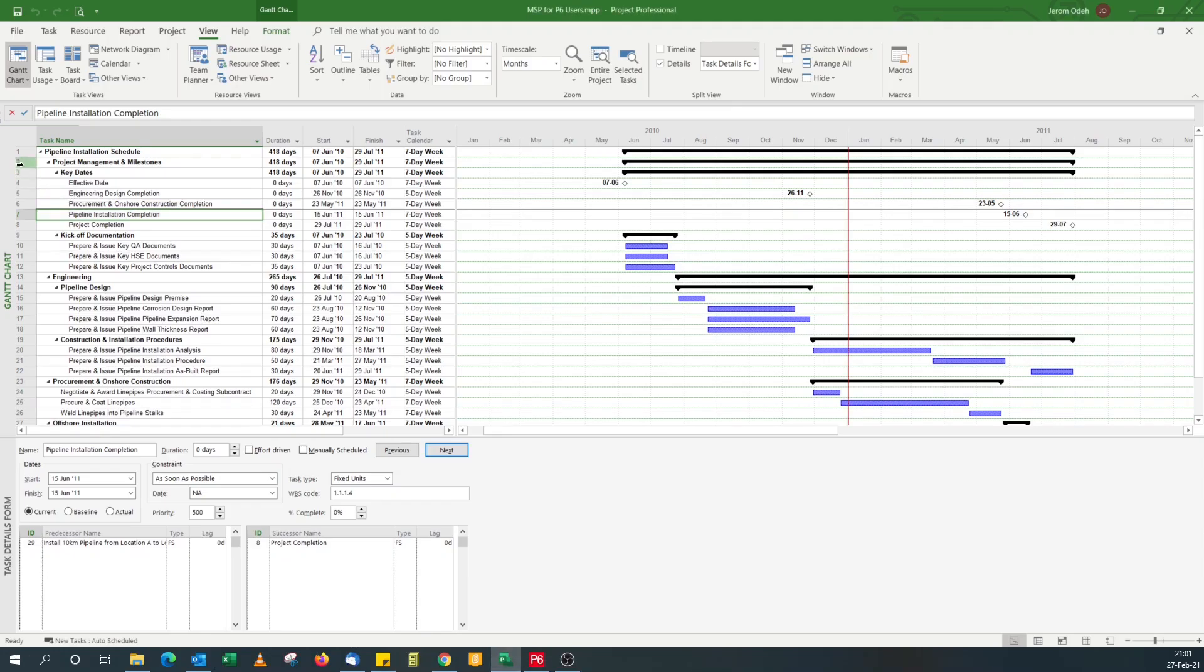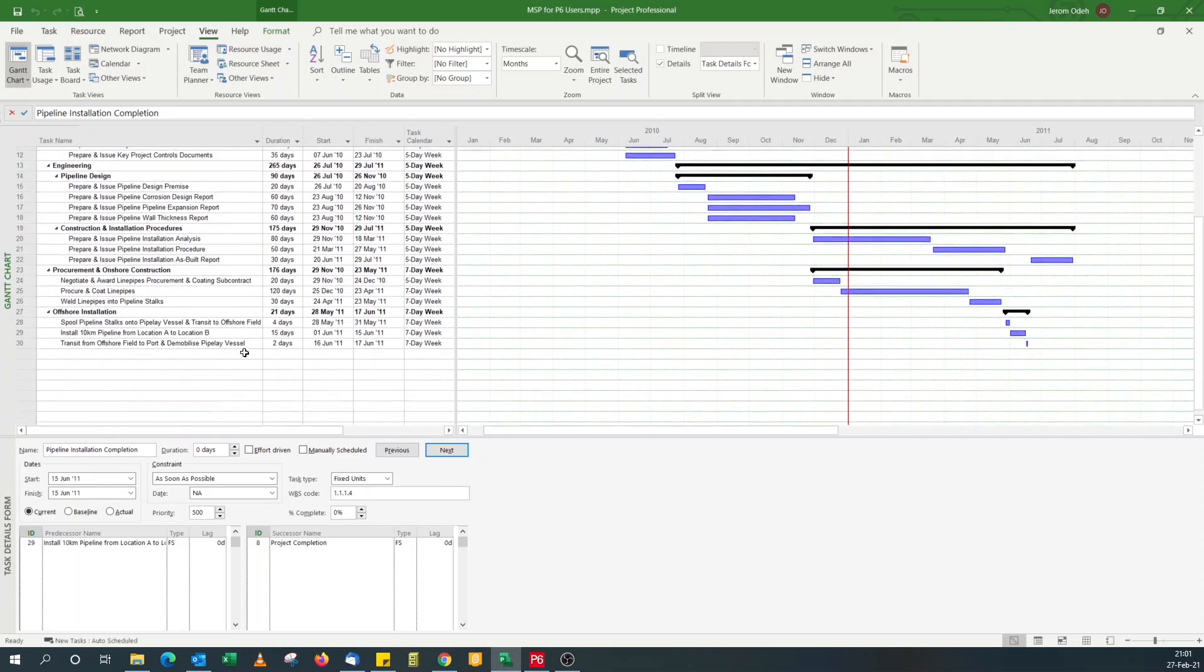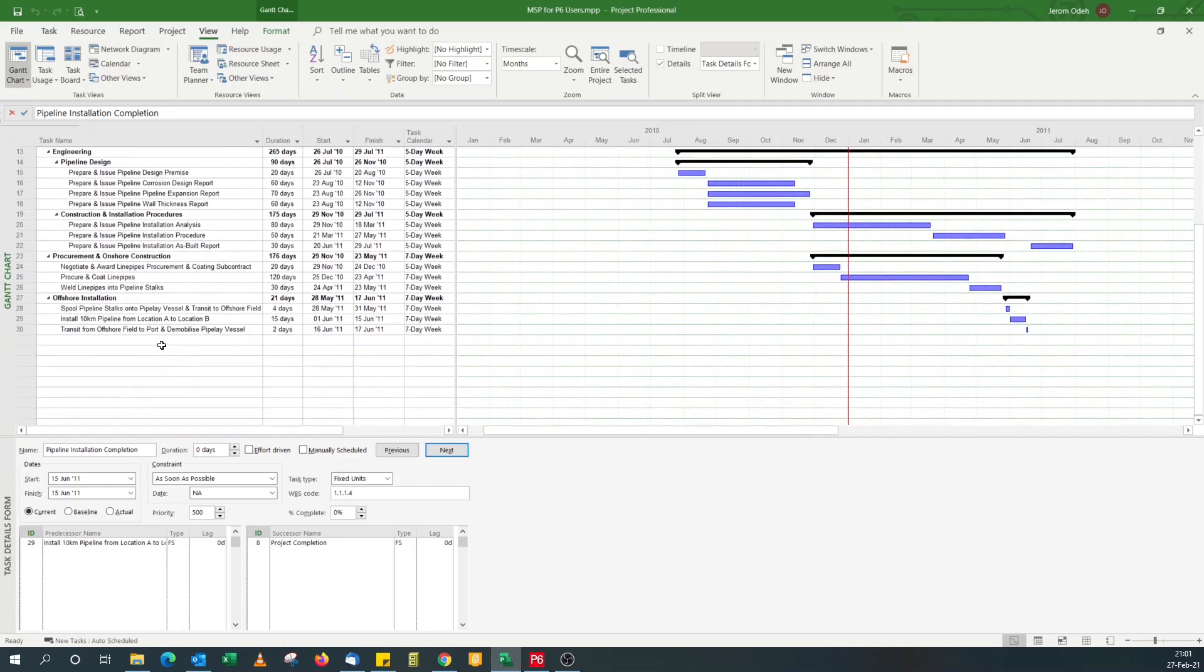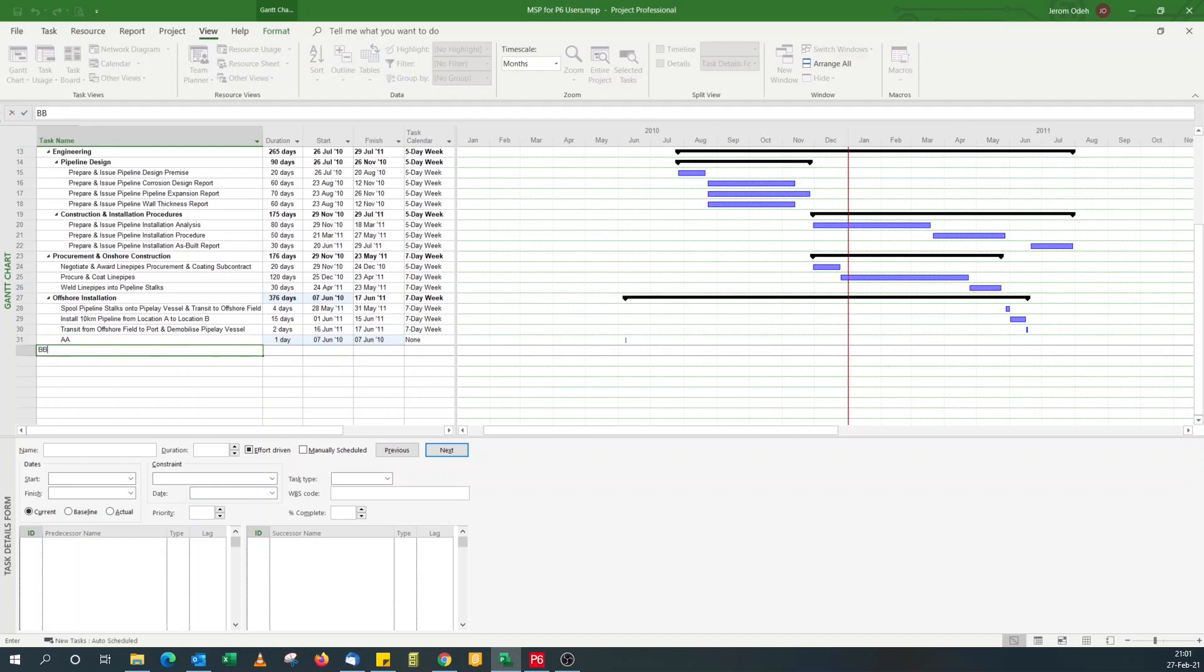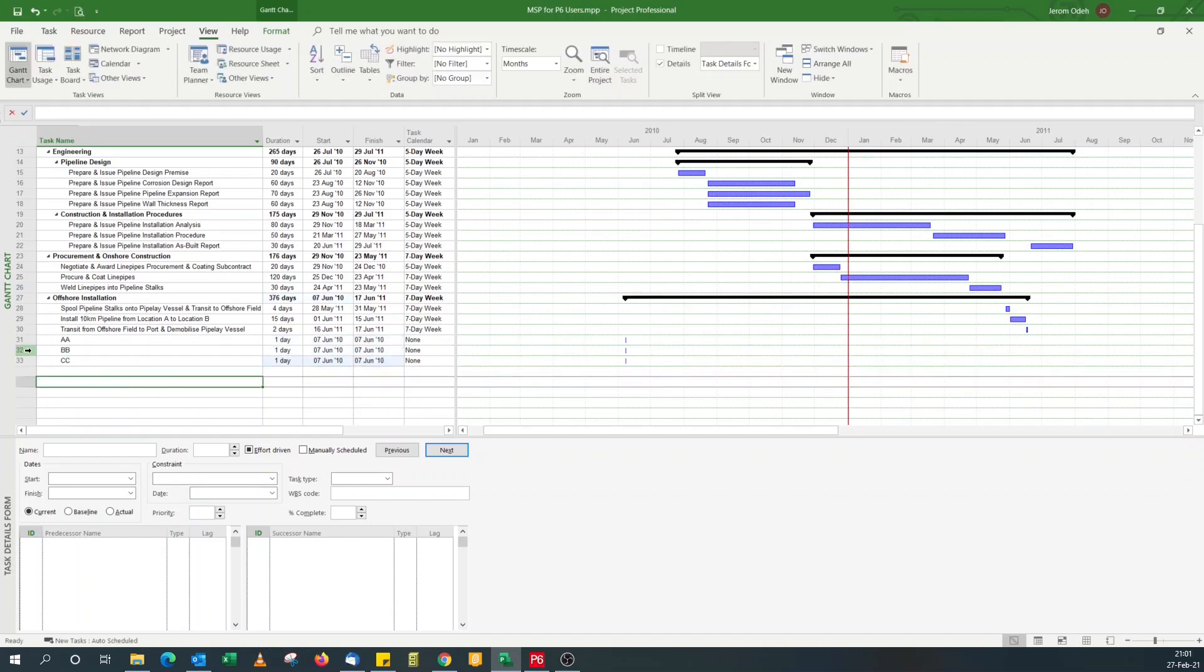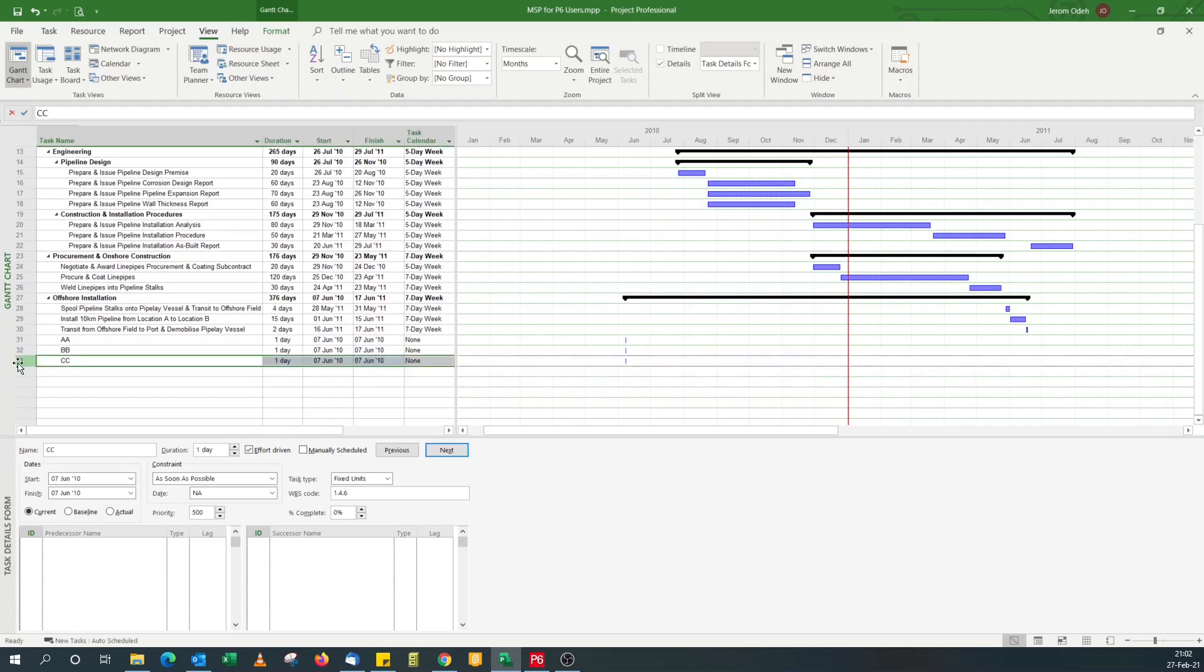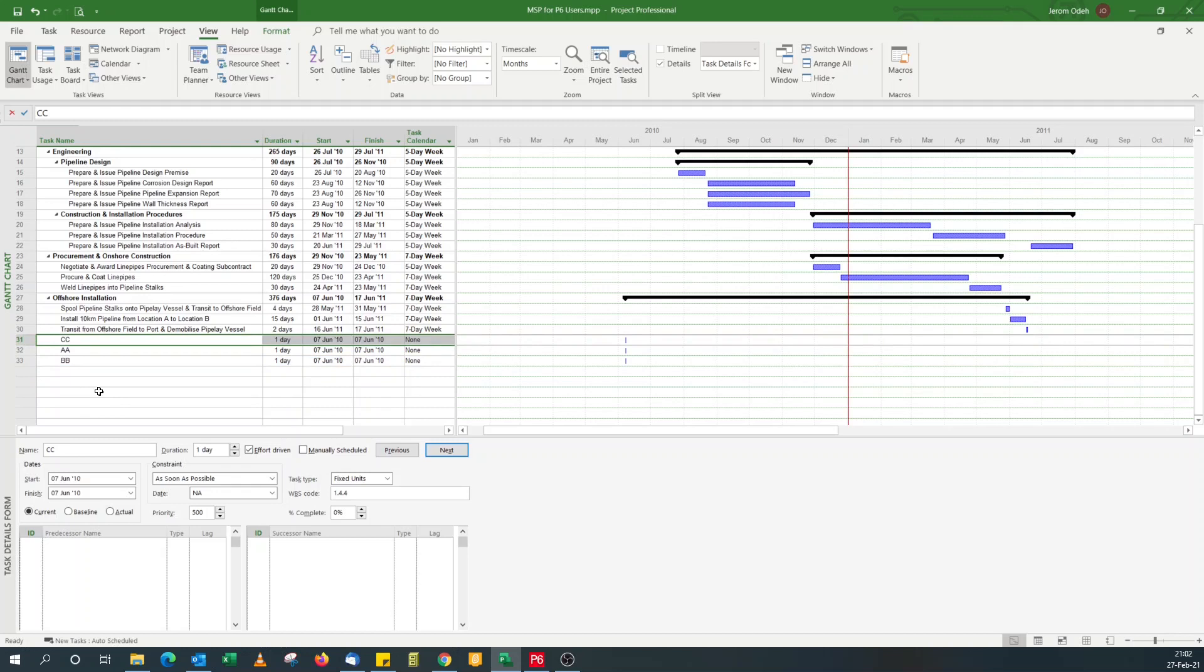While the line numbers are unique they are not assigned to any particular activity. I can demonstrate that by adding three new activities: AA, BB, CC. These three activities have line numbers 31, 32 and 33. If I move CC up by two places it becomes line number 31. That's not what you want. You want a permanent number, a fixed number attached to any activity you have or task as they call it in Microsoft Project.